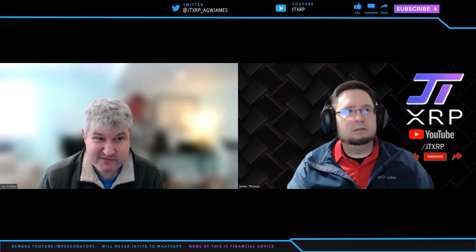So I had to make that case to the DAO and get buy-in that the start from scratch approach is right. And even then, I had to make another case that we should focus on an MVP, right? So there are all these features that my contract was supposed to be able to have implemented. Why don't we just try to duplicate all those features on the first go? I had to make the case for why it's important to start small, right? Build the foundation for the code base and let it do one thing really well. If it does that one thing really well, people are going to use the tool, and now we have an audience that can help us grow new features. They can tell us what they want, and we'll build it for them.